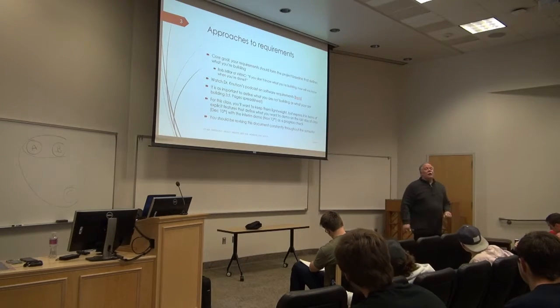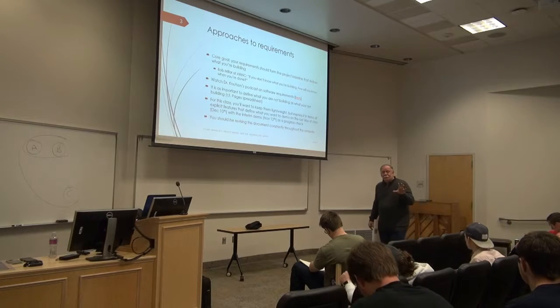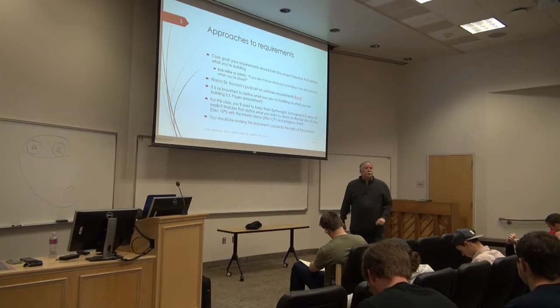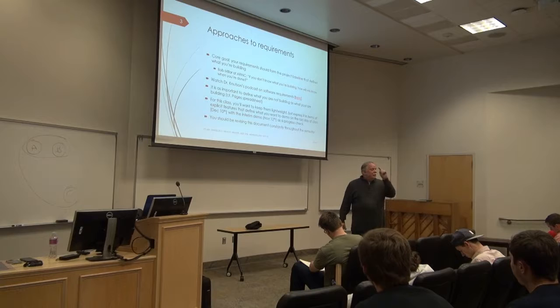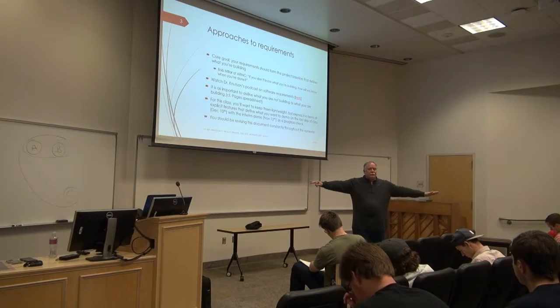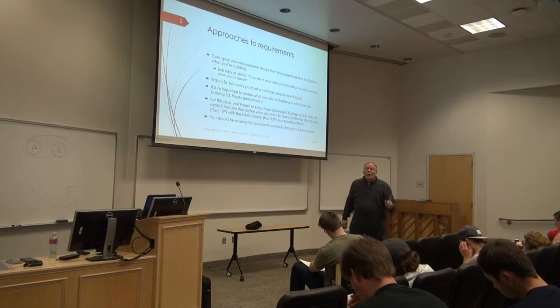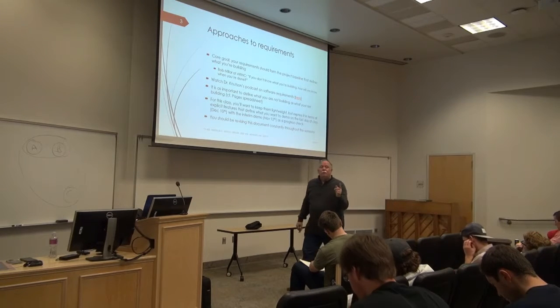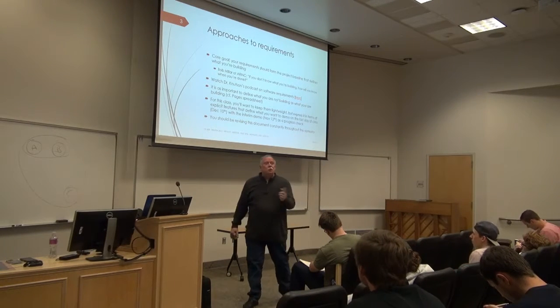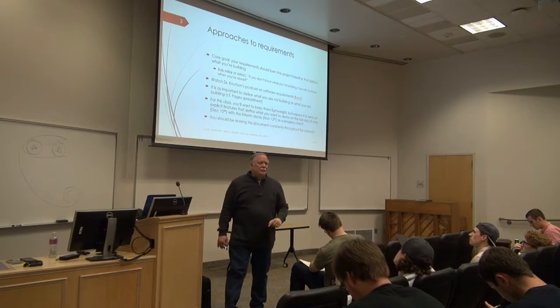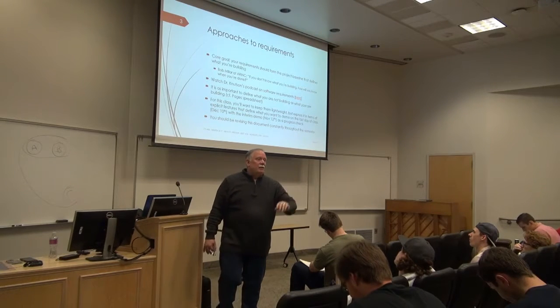That was a tremendous guideline, because anytime an issue came up as far as our development process, we could go to the spreadsheet and say, is this a 1.0 feature? If not, drop it. Don't do any work on it. Focus on the other stuff. And as we went along, a lot of 1.0 features moved into post 1.0 status. That was us dropping features.